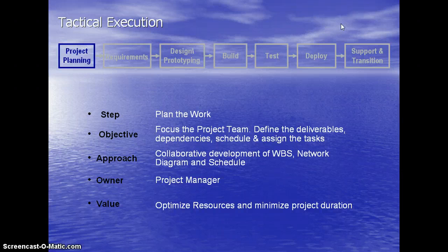Project planning. The project planning step, plan the work, is the most critical to successful delivery. Its success is dependent upon the quality of information provided to the project manager and the availability of trained and experienced resources with the skills and experience required when needed. New skills added at this point potentially wouldn't be available for 3 months, as they are already committed to other active projects. The planning horizon will drive this process, and it will change as process maturity improves. The estimates from the resource planning step and the quality of the progress and estimate at completion forecast of active projects are critical, and both are required.